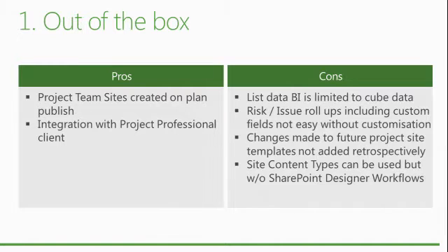So you could get over this. Risk lists are created. You could create something they call site content types, so you have a common content type that defines a risk across your whole site. And then you could attach that to all your project sites, and you would have the ability to do all that. And you might want to do a workflow that goes between risks and issues. It's a very common thing for escalation and approval. But you can't connect SharePoint Designer to the Project Web App, which means that if you want to do workflows, you have to code it.